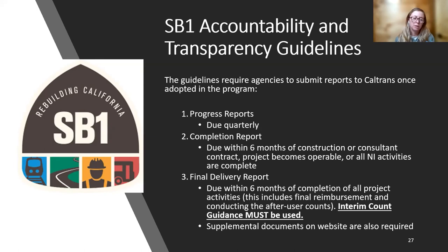I cannot stress enough how important it is, and it is required, that an agency uses the interim count guidance that can be found on multiple of our ATP websites. I know it's on the technical and general information page and also the reporting website, which I will share later. But it is so important for agencies to use that because if we don't have good count data to share with the commission, we can't show the success of the program. So it is required that this count guidance is used for the before counts and the after counts. So please don't forget that before you implement your project